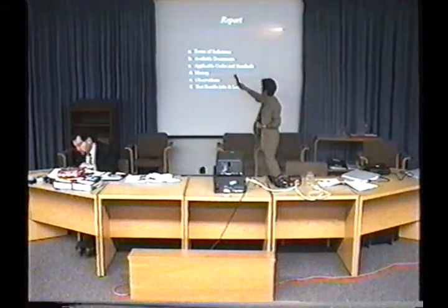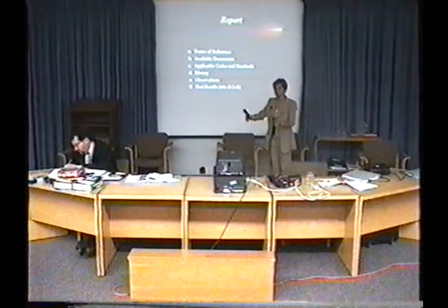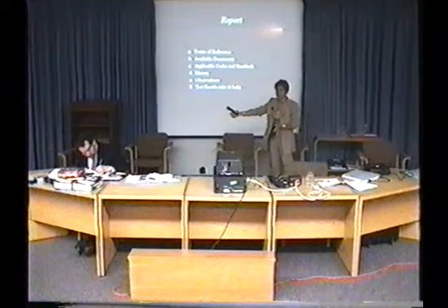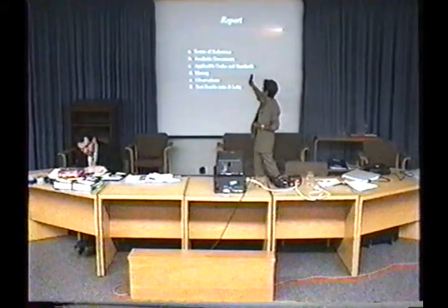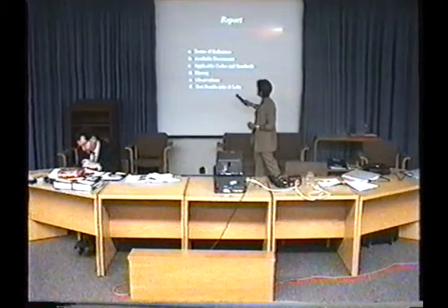What are the relevant standards? A lot of cases you go to court and the other side is looking at a standard that is totally irrelevant to the construction that you're looking at. Because the building code that applies would be the building code applicable at the time of construction. If it was 1986, that one applies, not the 1993 or 1998 code. So you have to be careful, or the standard that was available at that time.